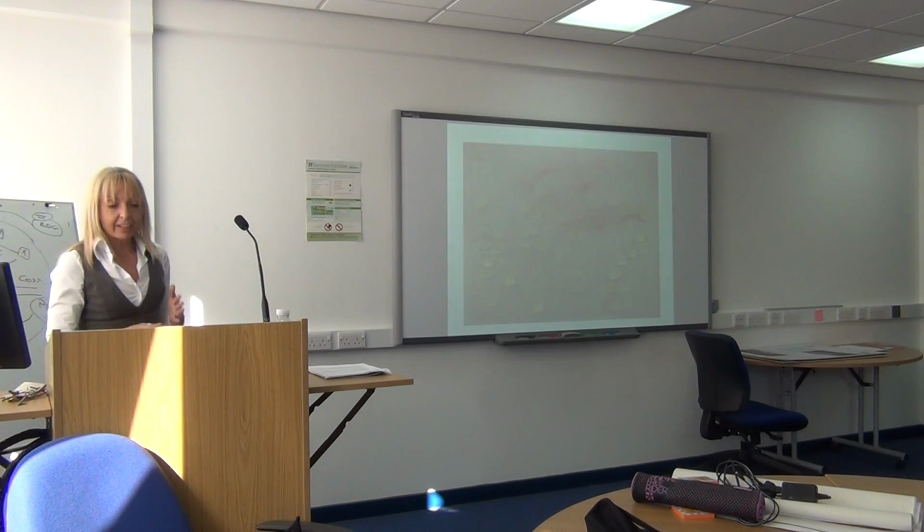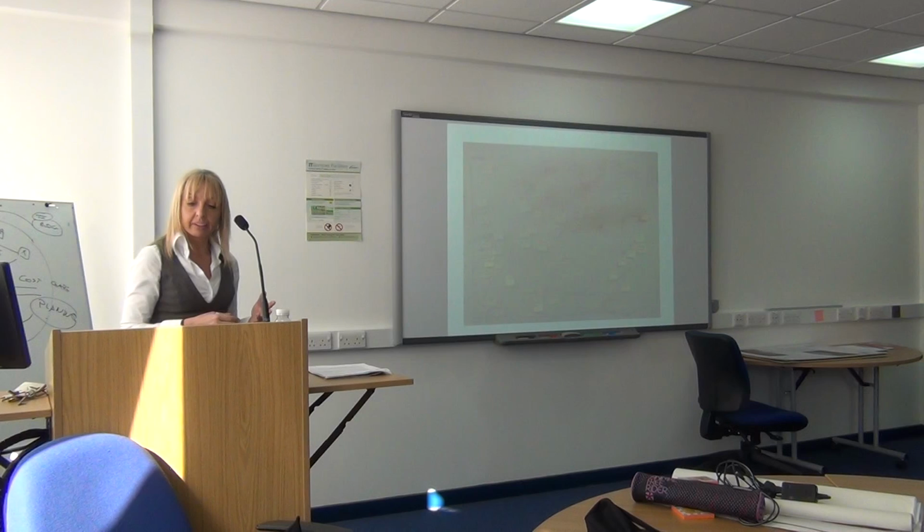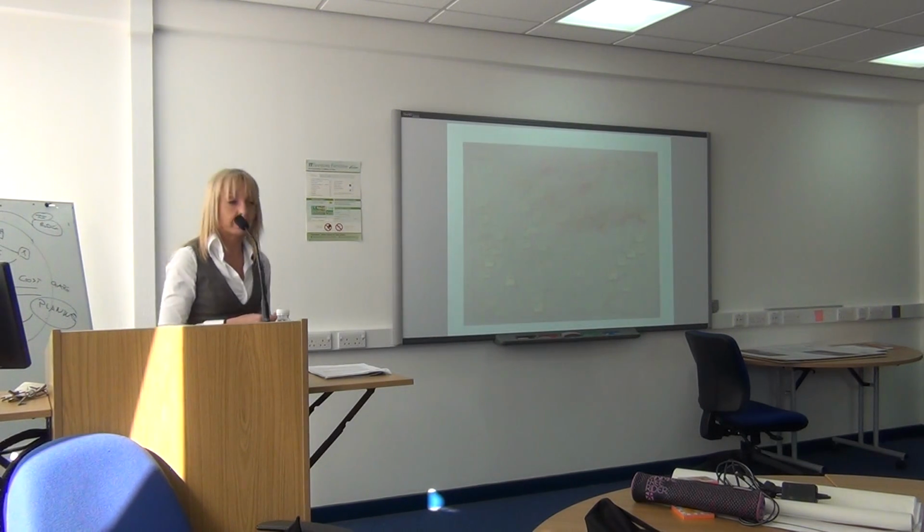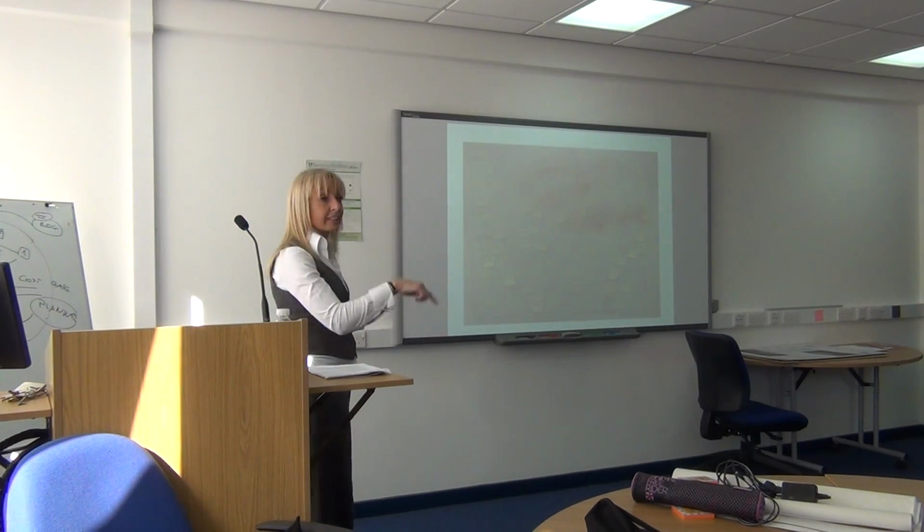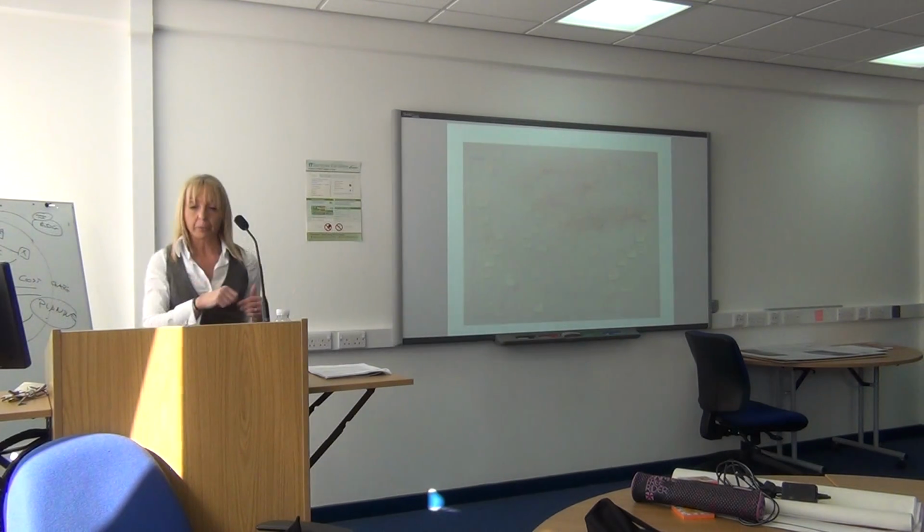So it depicts the relationships between the stakeholders with linking arrows. And the direction of the arrows indicates the nature of the relationship. So the head being the influencing one, it could be either way.